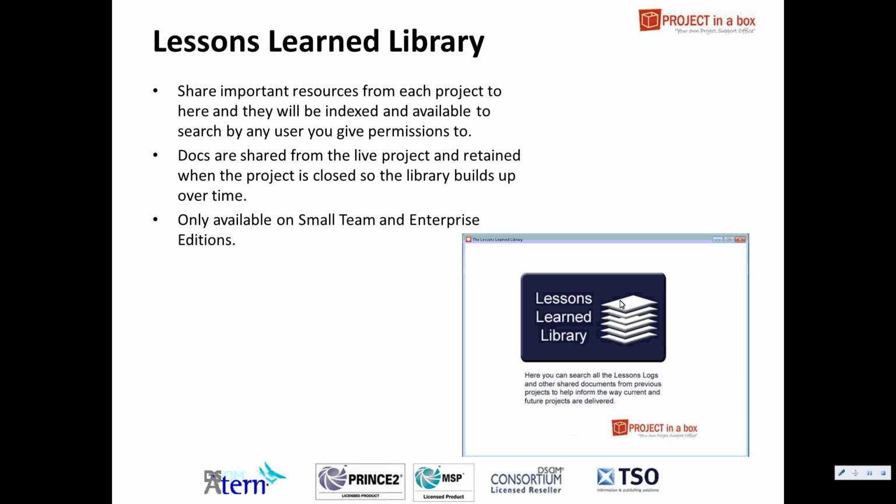So now we get on to the slightly different sort of methods. These are methods that we anticipate people creating just the once. So you create one lessons learned library on your server. You share into it documents from the projects that you think will be useful in the future for lessons, such as lessons learned logs, also project diaries, risk and issue registers, things of that type.